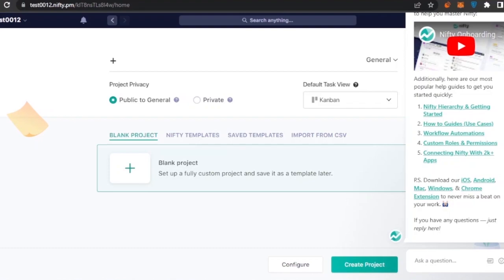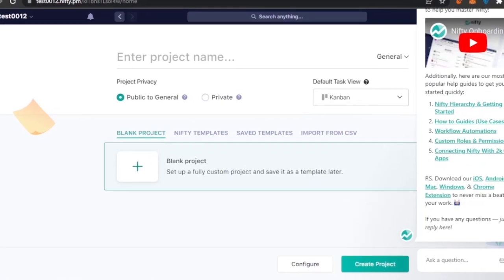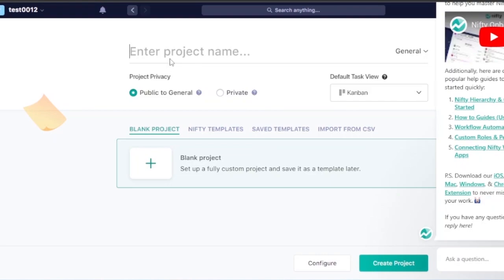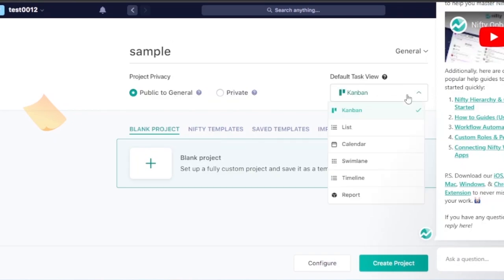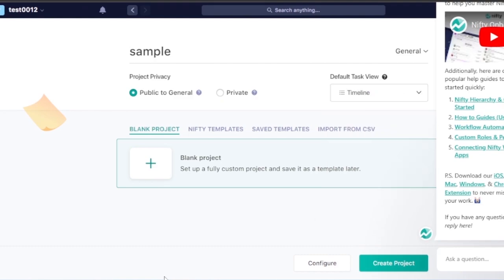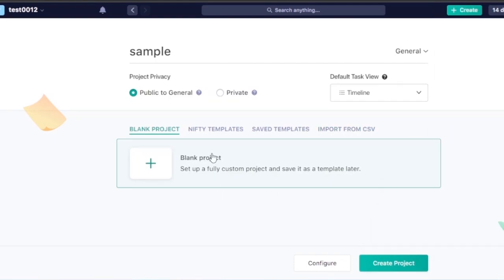Now there's an option to enter the project name — this will be the first project in our 'test0012' workspace. You'll set the project privacy (public or private) and choose the default task view: Kanban, list, calendar, swim lane, or timeline. I'm going to select timeline. You can also choose a blank project or use a Nifty template.